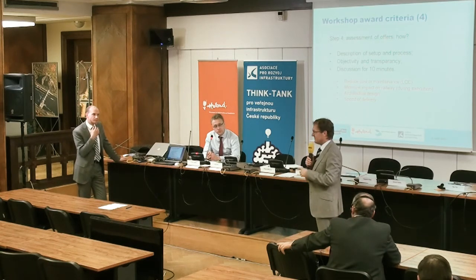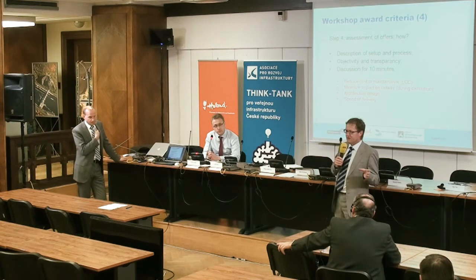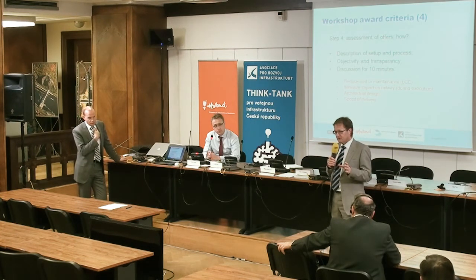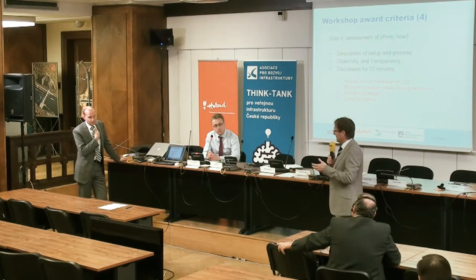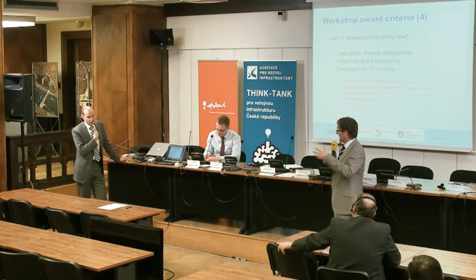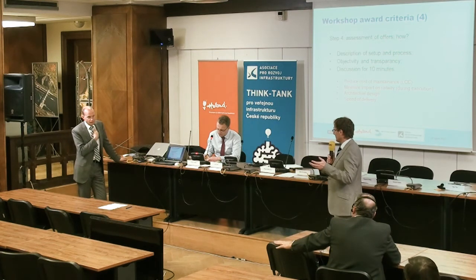We haven't mentioned that, but if you start a BVP project, at the beginning of the project, you sometimes organize a whole day just for the contractors. You invite them and you explain about the project, about best value procurement, about your expectations of what they are going to do, how the process is going to be, how the procedures will take place.